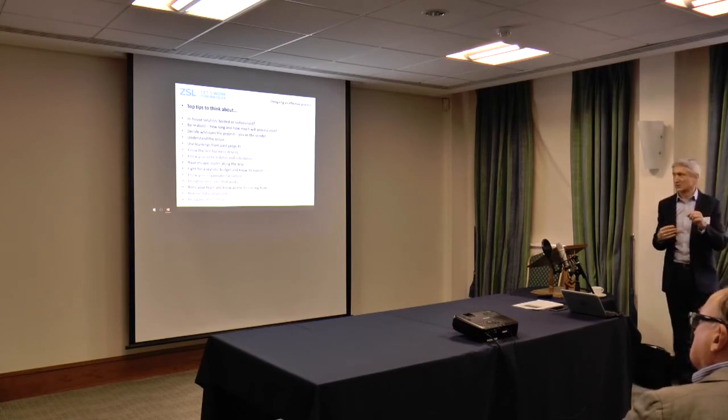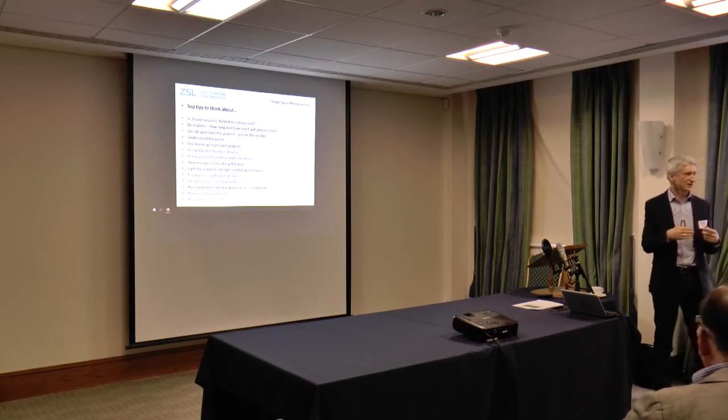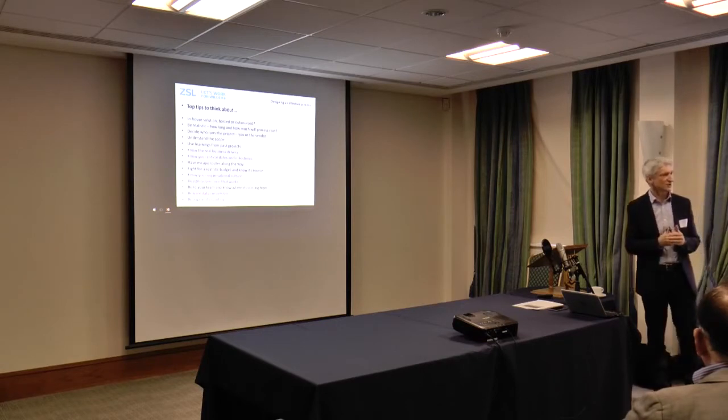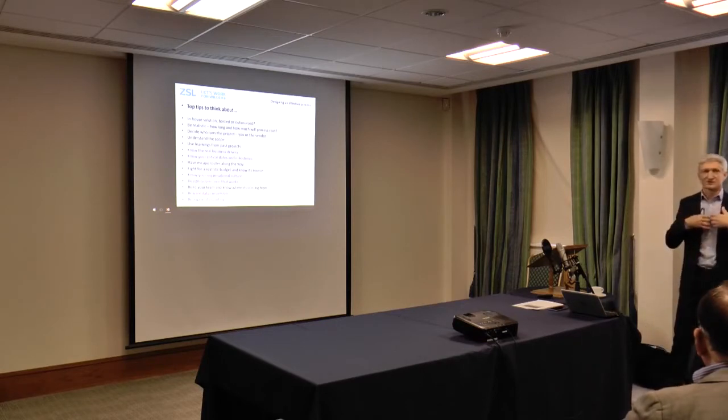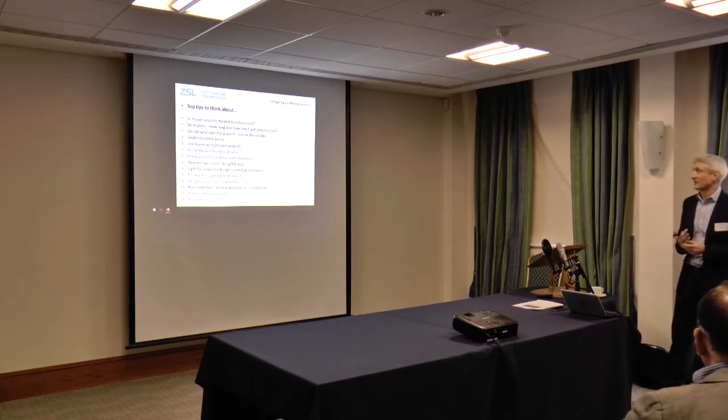And there were some other dates that crept on us that we should have known about that we didn't. So there were some governance dates with our council that we sort of thought we got right, but then they changed them, and that had an impact on the project. So again, this is all part of what you need to be thinking about and feeling about.